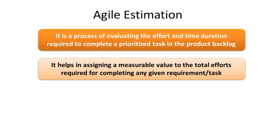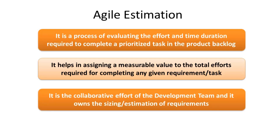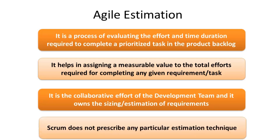Total effort is the summation of efforts required for all the activities — design, analysis, development, testing, deployment, and any other step performed to completely implement the requirement. It is the collaborative effort of the development team. The development team owns the sizing and estimation, and no one should question them for their estimation other than the development team members themselves. Scrum does not prescribe any particular estimation technique.